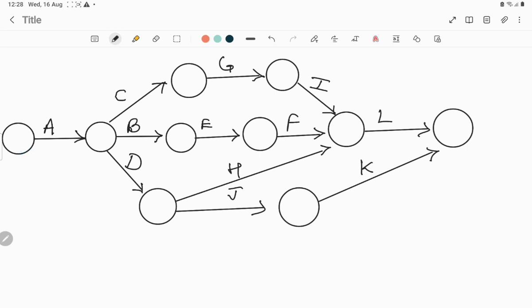Okay, so this was the explanation. I'll explain again. There is activity A here. It starts from the starting event because there is no predecessor of activity A, none. So it will start. This is the clue. The activity or network will start from this event, the starting event.